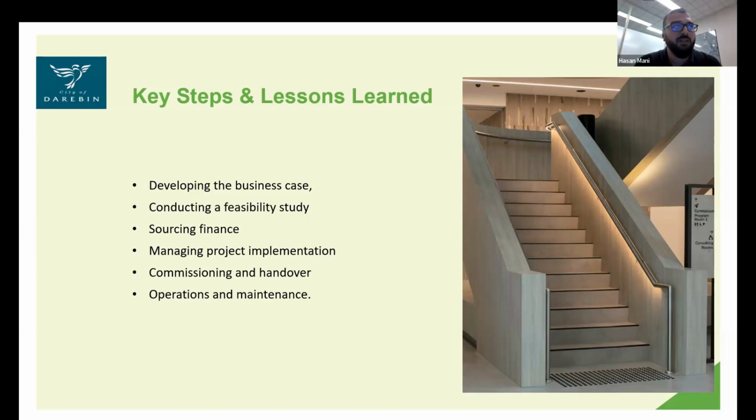Yeah, and during construction, a lesson learned, as Amol touched on, was that some of the joinery was not documented correctly or was not there at all. What I've also found is the card readers issue. During design development, council didn't have an appropriate security system in place for such buildings, and we had sub-consultants who designed the security system. Once we went out to construction, council developed a new security system, and we had to update the security system for NARC.